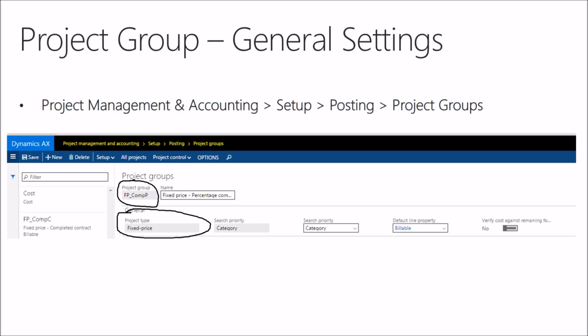So you can create a forecast, and we'll use a quantity, for example, of 100 hours. There's such a thing as a reducing forecast, so every time you post actuals, it will reduce your forecasted amount. If you post 10 hours, it will reduce that 100 hours that you forecasted down to 90. Once you hit 0, if you have this toggled to yes, it will throw warnings all over the place telling you that you're going over your forecasted amount.